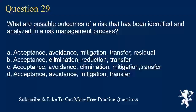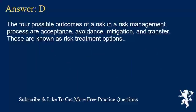Question 29. What are possible outcomes of a risk that has been identified and analyzed in a risk management process? A. Acceptance, avoidance, mitigation, transfer, residual. B. Acceptance, elimination, reduction, transfer. C. Acceptance, avoidance, elimination, mitigation, transfer. D. Acceptance, avoidance, mitigation, transfer. Answer D. The four possible outcomes of a risk in a risk management process are acceptance, avoidance, mitigation, and transfer. These are known as risk treatment options.